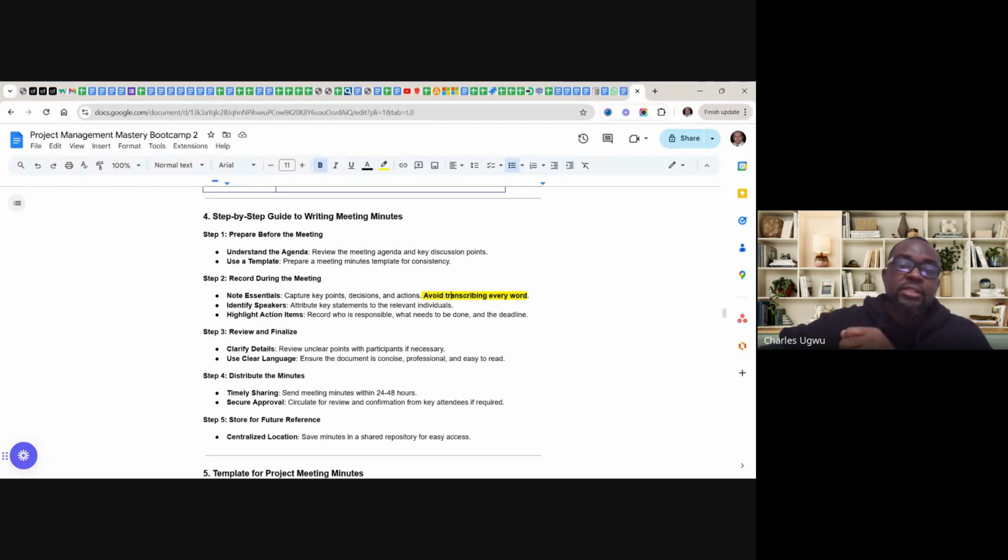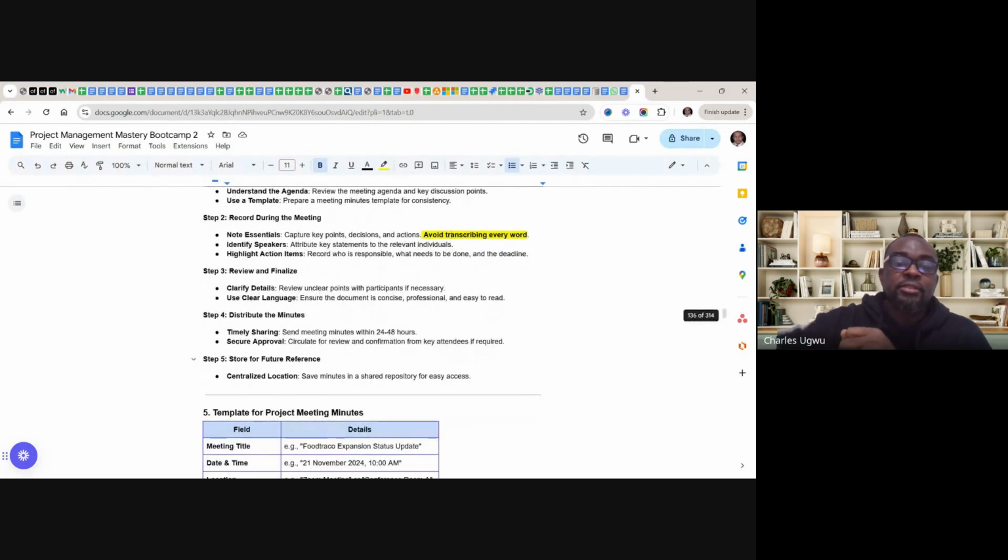Distribute the meeting minutes. Timely sharing: send meeting minutes within 24 to 48 hours. Every meeting, when you finish the minutes, they should be distributed to all the participants of that meeting, so that people can validate.